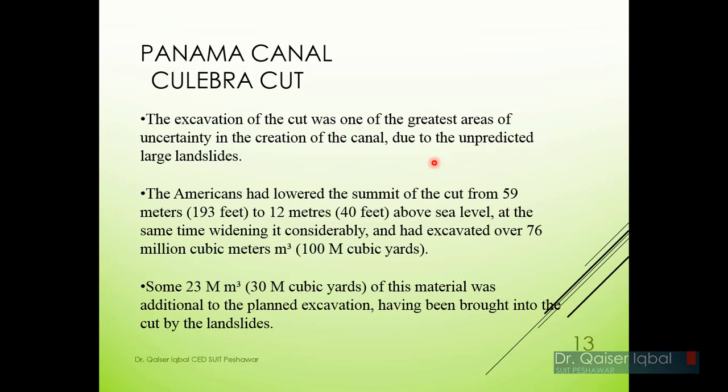So the excavation, the main problem they had was at Culebra Cut. The excavation of the cut was one of the greatest areas of uncertainty because they did not understand soil mechanics very well. The slope stability theorems were presented later on, when they understood the soil very well. Because they did not understand it, during the excavation there were unprecedented large landslides.